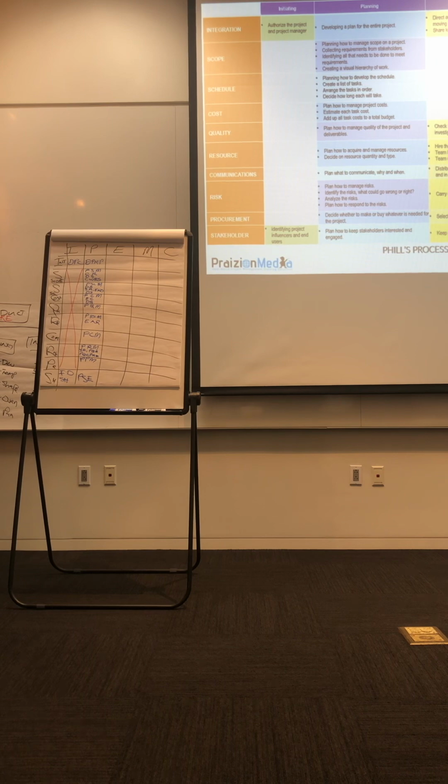But if it's a very high dollar, like some projects that are done in corporate, 10 million, 20 million, 30 million, and then it all adds up. So if I was in a PMO and I had like 200 million worth of projects, like in our PMO in corporate, I might choose to do a quantitative on a lot of them, just to make sure that in aggregate I'm not going to lose out, or I'm not going to be in trouble. Because all you need is 3 or 4 distressed high value projects. So you really should be thinking about the quantitative and taking steps to mitigate, at a minimum, some of those risks. Great question.